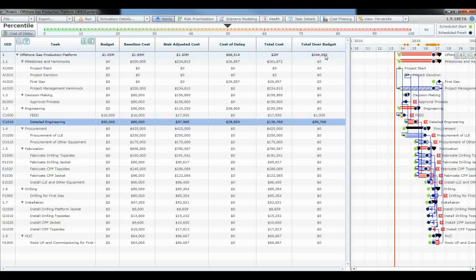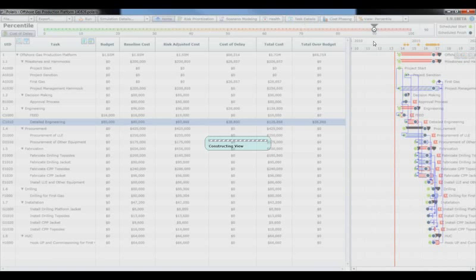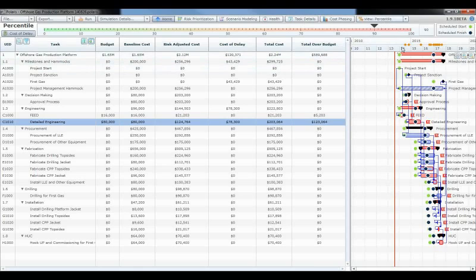So this is actually showing you, maybe in contingency at a P50, I need to carry $350,000 to make sure that I'm covered for all the risk and possible liquidated damages that I might have to pay out as a contractor. Also, you could go up here, you could adjust up to a higher level. This really just goes into how you want to manage your project and how risk averse or comfortable with risk that you are.